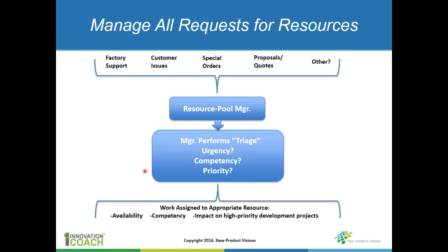And really, it's better to think of all this stuff as flowing through a focal point. And the best person to do this is whoever's managing that pool of resources. Then they look at these requests in terms of performing some triage. What's the urgency? Who really has to do this? Maybe manufacturing is coming and saying, hey, I need this person to do this. But the manager knows that there's somebody else that can do this. They actually have more time right now,